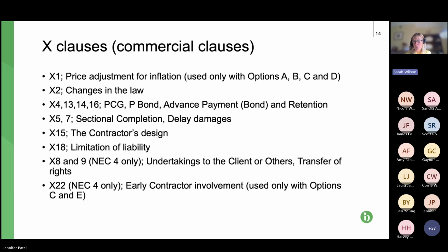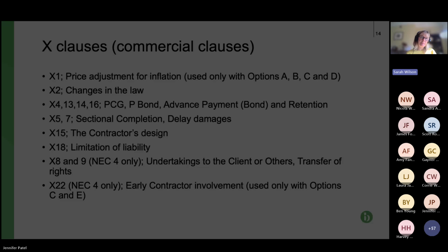So it allows the contractor to do work to work out what the proper price is going to be, probably carry out some site investigation, possibly carry out a bit of design work and get paid for all of that, rather than what currently seems to happen, which is the contractor does all that work at risk. And, you know, it then makes things difficult when the parties are trying to enter into a contract. Next slide, please.